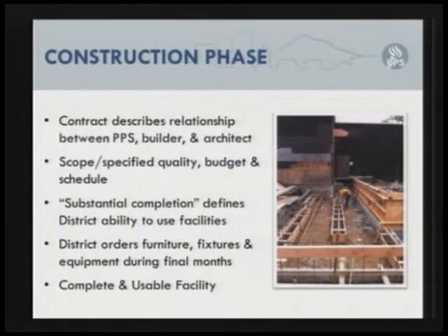Introducing the term substantial completion, that's a contractual term that defines our ability to use the improvements per the contract. Substantial completion, however, does not mean that the school is ready for kids. And so as we look at completing the construction, we also have to ensure that all the furniture, fixture, and equipment is all in place, has been set up, has been configured, all of the building systems have been tested, the building commissioned, if you will, and that it is ready. Terminology here that we like to use is complete and usable. And of course, for the projects for this summer, for example, we want complete and usable facilities such that students can use the improvements immediately upon the start of school in September.